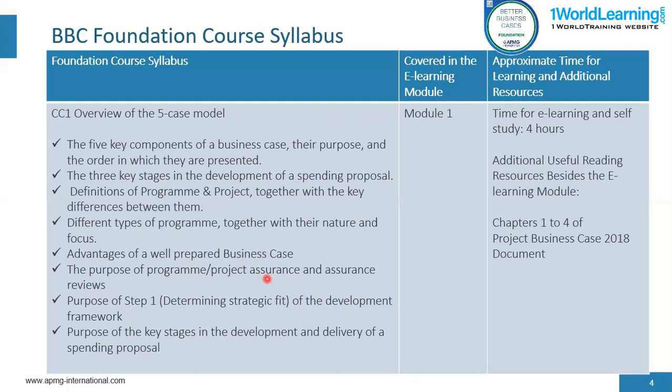In the context of government initiatives, for example, in countries like the UK and New Zealand, they do conduct assurance audits called gateway reviews, which are useful ways of ascertaining the confidence and providing the needed advice for the responsible owners of the investments. In this particular syllabus area, we would also cover step 1 of the development framework.